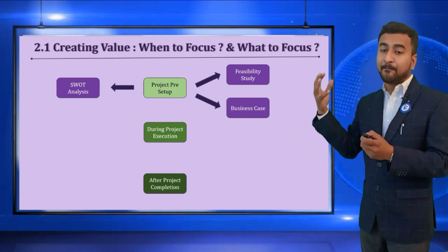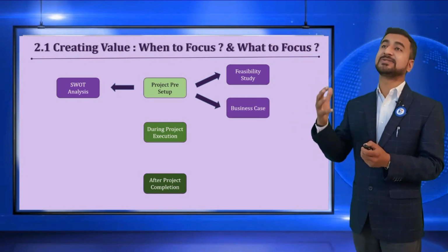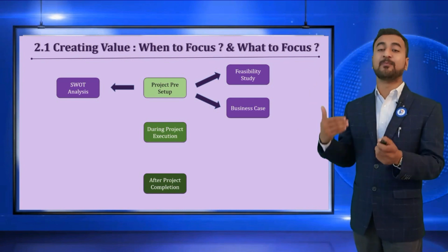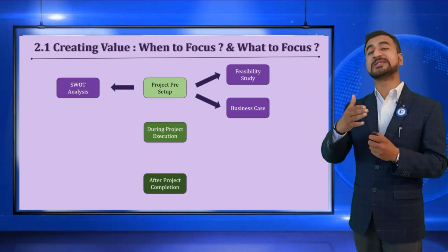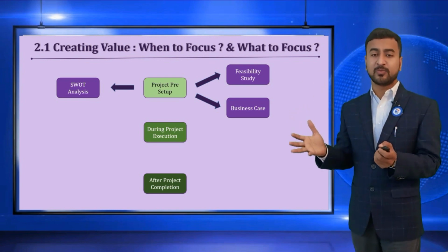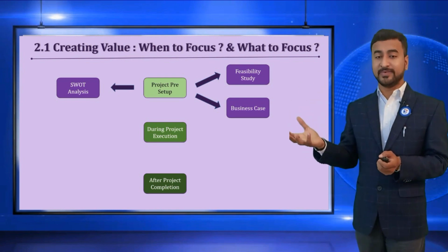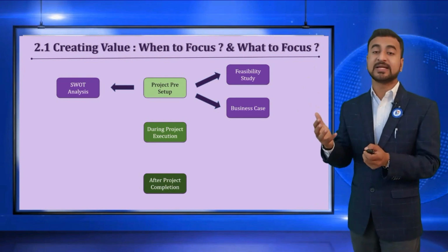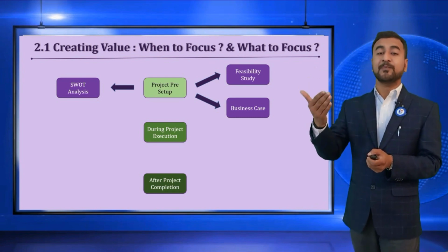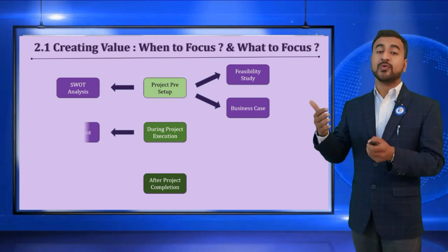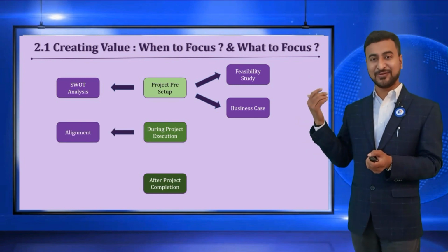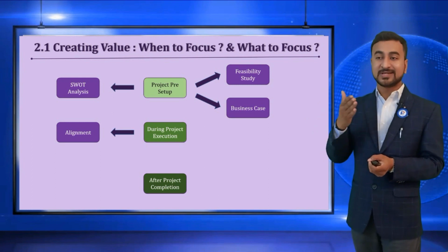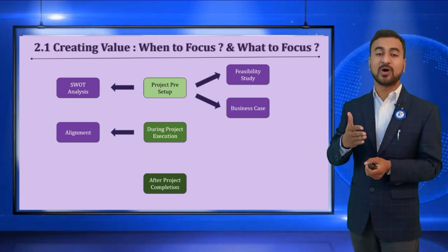And then the business case. In the business case, you do all the detailed analysis: what is the cost required, what is the benefit, what is the return on investment, what is the payback period for this particular project, whether to invest or not to invest. So all of this needs to be discussed and understood in terms of value delivery before you even start the project. During the project, can you guess? Yes, alignment. So you have to constantly justify the business case throughout the project.